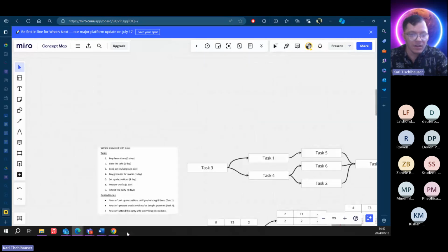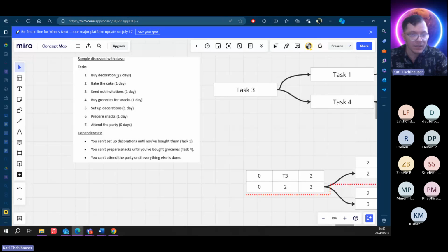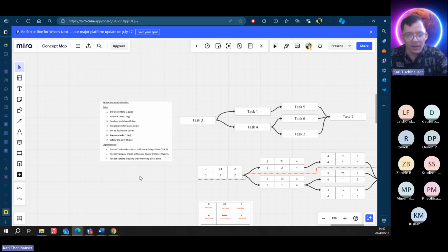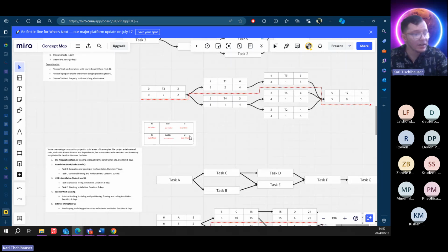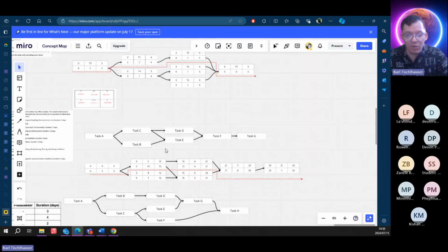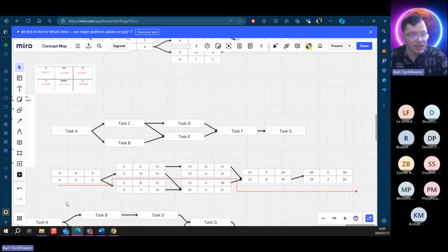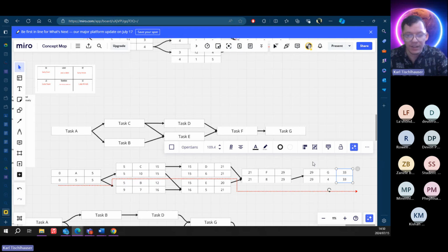When you do this task for your own project, you're going to tell us what the task is, the duration, and the sequence: what must go first, second, third, and what can happen together, in parallel. So the other benefit of doing a critical path analysis is it lets you think about the project holistically, the tasks, and what can be moved around without affecting that final finish date.